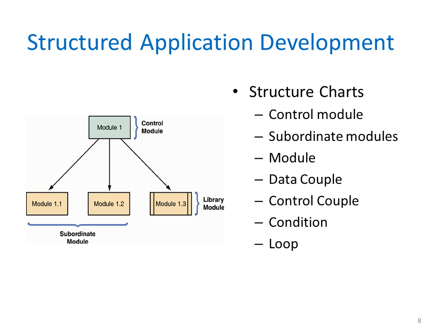After a systems analyst documents the system's requirements, he or she breaks the system down into subsystems and modules in a process called partitioning. This approach is also called modular design, and it is similar to constructing a leveled set of DFDs. By assigning modules to different programmers, several development areas can proceed at the same time.